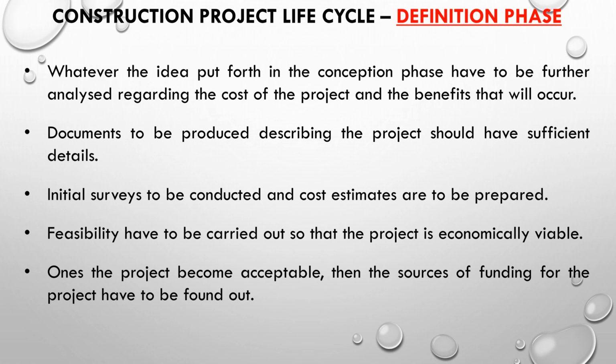Initial surveys have to be conducted and cost estimates are to be prepared. Feasibility has to be carried out so that the project is economically viable. Once the project becomes acceptable, then the sources of funding for the project have to be found out.